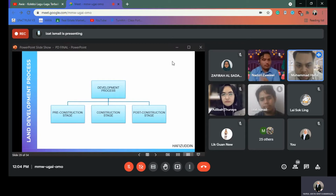Last, the post-construction stage involves final inspection. The developer is required to submit requests for clearance of site and commissioning report to OSC once the construction stage is complete. OSC will issue notice for final inspection, which consists of two stages by different technical departments. Final inspection one is carried out by National Facilities Provider, NFP, and final inspection two involves Jabatan Bomba dan Penyelamat, DOSH and IWK. Then, issuance of certificate of completion and compliance by paying deposit of CCC and submitting for G first, and the last one, handover vacant possession.